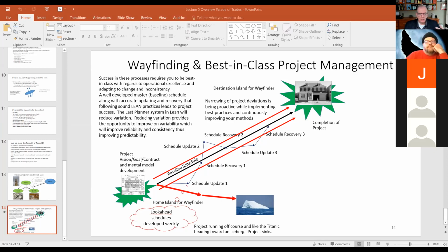So it's not just, oh, this change, I wonder what it's going to impact. It can be brought into the discussions and planning sessions, because you do them collaboratively. That helps you better spot that yes, this change to the electrical system is doing this, but it's going to interfere with our ability to do this. So how can we better schedule this out? And what are the cost implications of this to the other trades?